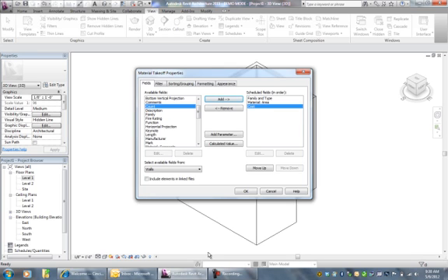But next week we'll start looking at walls that have some composition to them: brick, vapor barrier, studs, stuff like that. So when you get into material cost, you'll be able to say, I'd like a square foot cost of the vapor barrier, I'd like a square foot cost of the brick, and you can refine the cost to that degree. But the cost we're talking about right now is just the cost we had in the type properties box.